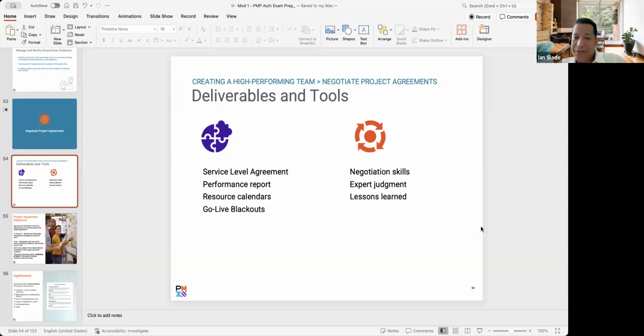What you want to be able to do is to do both all throughout. You want to bring up the good things, and you also want to bring up the things that didn't work, so that in the next milestone, the next phase, the next gate, whatever next is, you're able to learn from it and apply it right away. The tendency we have is to kind of smooth over the negative, and then towards the end, that's when we bring it up. So Nick, how did you really feel? And at that point, it's kind of too late for this project. It'll help someone else in their project, the same or similar, but not so much for this project.